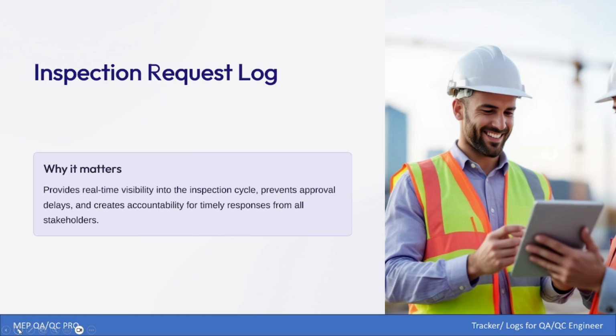If something like a delay, any liability, or liquidated damages, or anything happens or comes your way as a claim from the consultant side or the main contractor, through the inspection log you can easily track and prove your work has been done and approved or is under review, and so on.